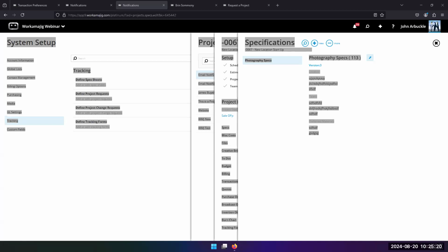Like I said, there's not that connection to budget. Oh, I need to change the budget. Can it automatically create budget? No, we don't do that, because that's numbers. What am I going to change? That gets very intricate and probably takes somebody sitting down and making those decisions, as opposed to letting the system just blast it in. That's the nature. We kind of stop at the spec. That should probably drive you to say, I need less or more work, so I need to change my budget for more or less, using the change orders to track those differences.